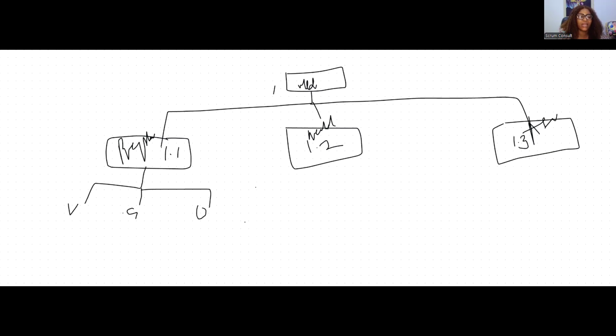Now, these vendors, under vendors, you can further decompose vendors to what? Are we contracting it out? Caterer. Decorators. So you see what we are doing? We are decomposing this task. So at this point here, you have here 1.1.1. This will be 1.1.2. And this will be 1.1.3.